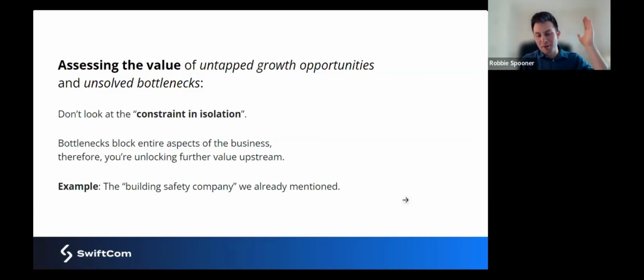And leading back to maybe the very first slide of these $1 million opportunities, one of my favorite examples on this front is a building company. And in their case, they are really struggling with inaccurate invoicing. Basically, what is being done on site is not being accurately collected because it was a paper-based system, and that then led to discrepancies between the QS or the quantity surveyor authorizing payments, and therefore cash flow issues emerge.